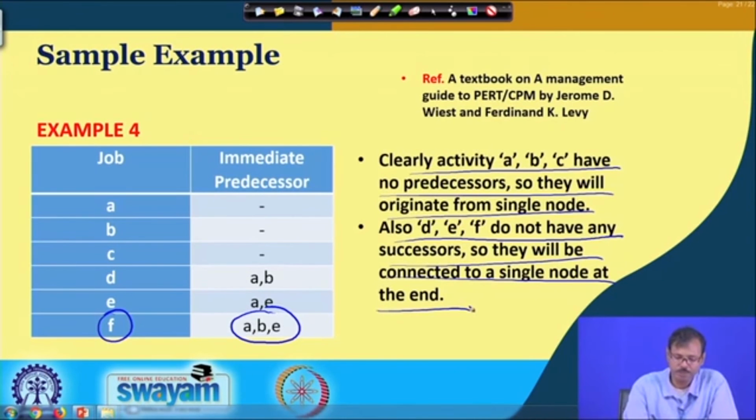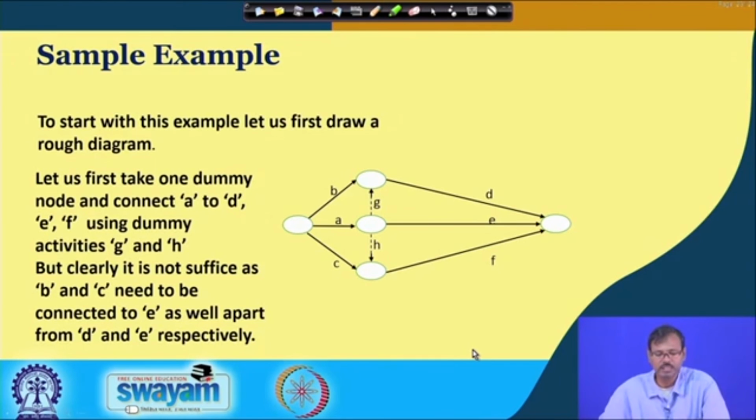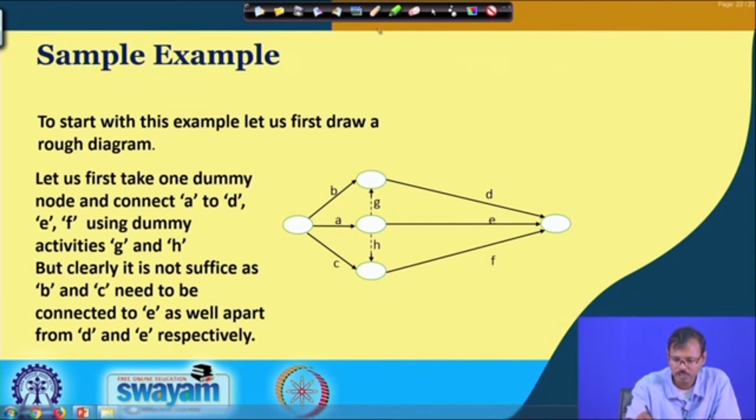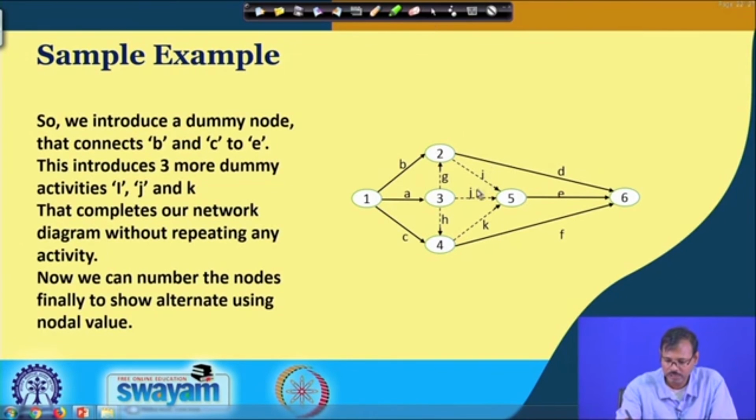So, that means their precedence must be followed with given dummy jobs presented suitably as it is represented in this diagram. So, you can see all the terminating nodes are meeting in the end and this is the starting node from which the initial jobs are started and they are connected with two dummy jobs, so that their precedence is well accepted using this fifth node at this position.